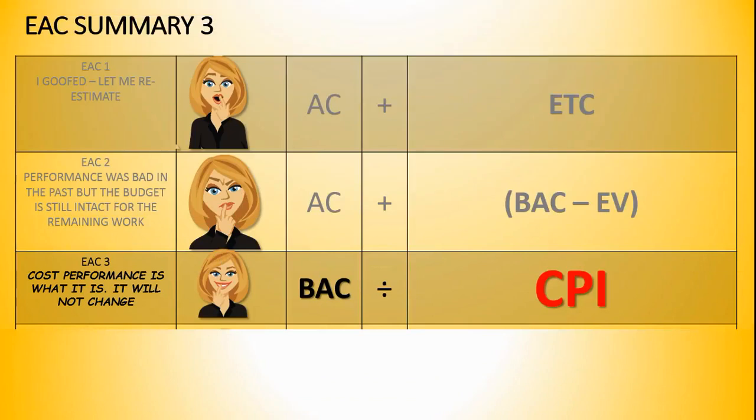Let's take a look at this third one. This one means what is of primary concern is cost performance. Cost performance is what it is. It will not change. And that's why we factor in the CPI, cost performance index. So we take our budget, and we say, based on the performance, this is what our EAC is going to be. BAC divided by CPI.